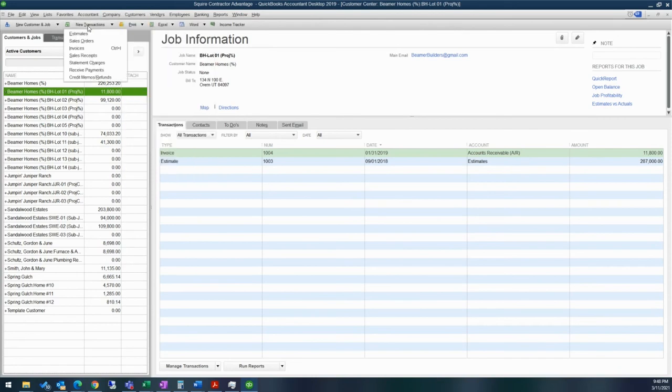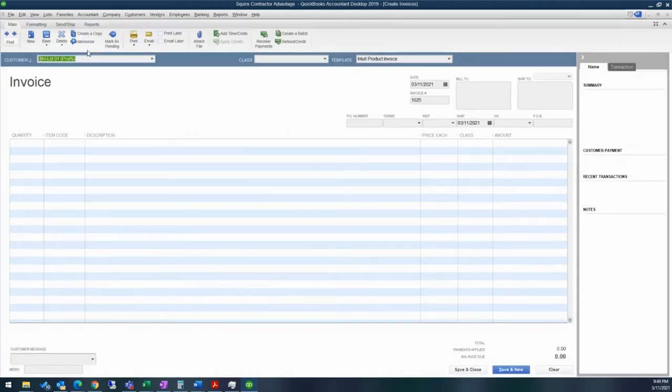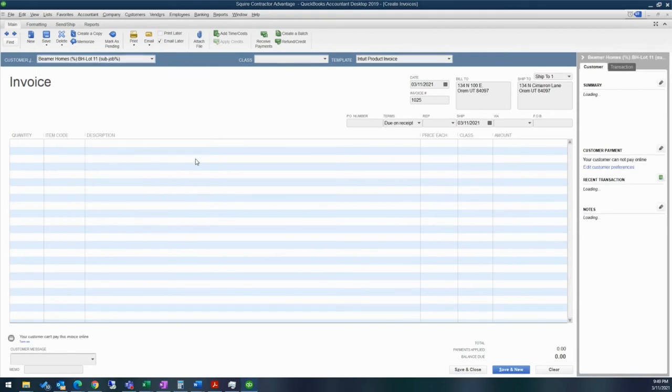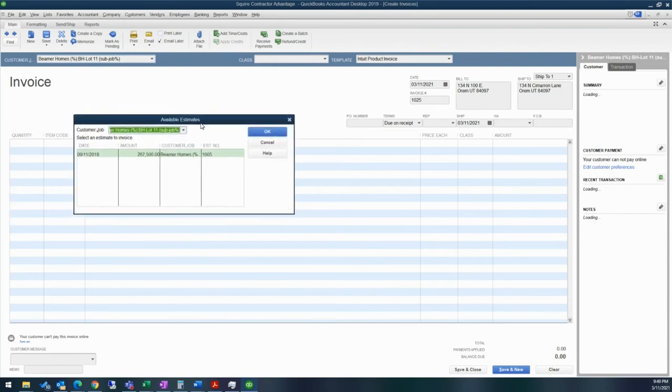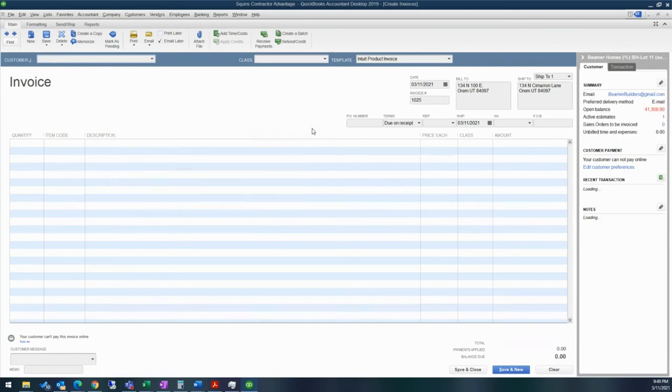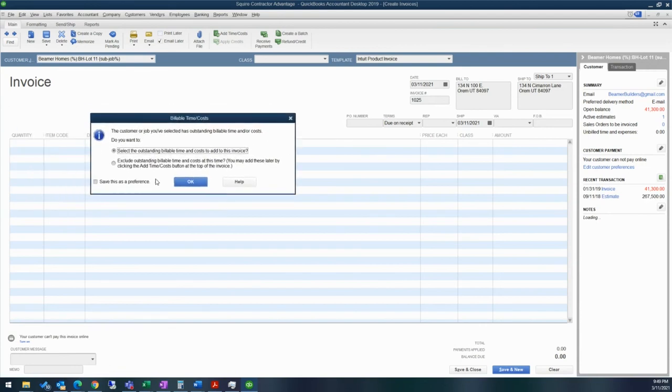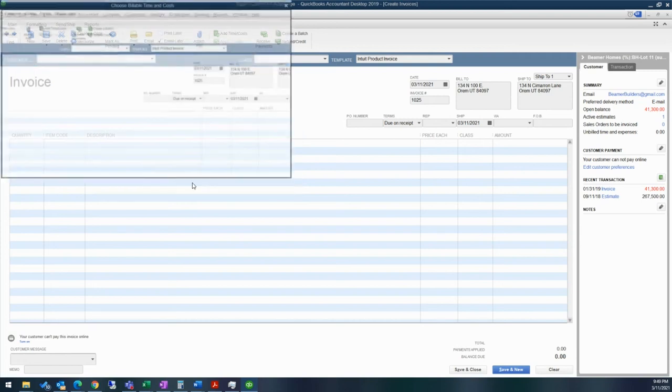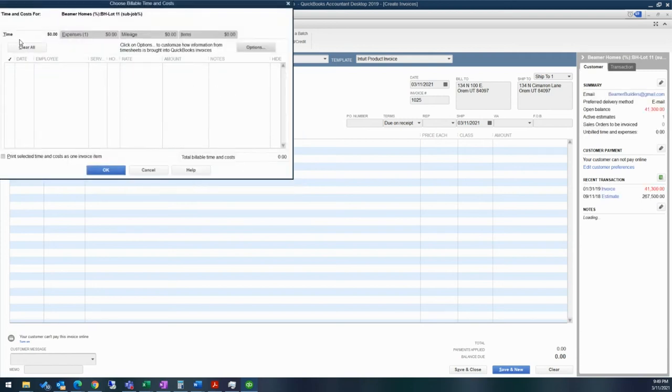And then for my customers, there's a couple of different ways you can invoice either from customers, create invoices, new transactions, invoices, or you can even do control I and that will pull up the invoice. So I want to invoice that particular item that's on lot one. It's going to tell me that we have some available estimates. Would I like to add it in? And I do not want to add in my estimates. I have billable time costs. So I have the option of either selecting the outstanding billable time and costs to add to this invoice or I can exclude outstanding billable time and costs at this time. Although you can add them later if you use this button up here, add time slash costs. I'm going to go ahead and say yes. I want to go ahead and add it in.